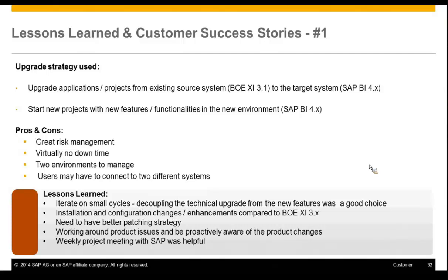The pros and cons of following that strategy are: you can manage the risk effectively, and you can maintain near-zero downtime. At the same time, you'll be maintaining two environments. Basically, you'll be doing a parallel environment, which is effectively expensive to put together. But at the same time, it will help you to manage the timeline, to manage the downtime, and things like that. And then users won't notice, but they have to switch from one system to the other system.